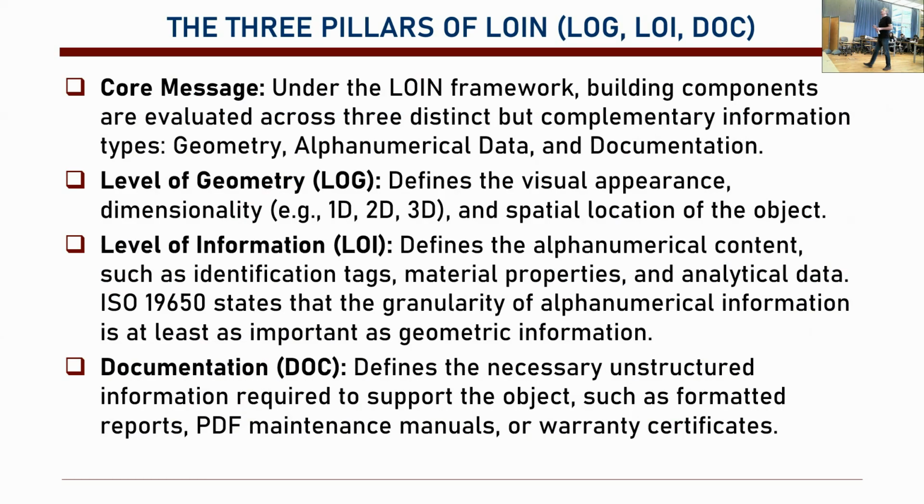Okay? So, there are three pillars of LOI. LOG, LOI, DOC. Done. So, LOG is level of geometry. Basically, it can even be one-dimensional or two-dimensional. It can be just a document. Level of information. What kind of alphanumerical content do we need?